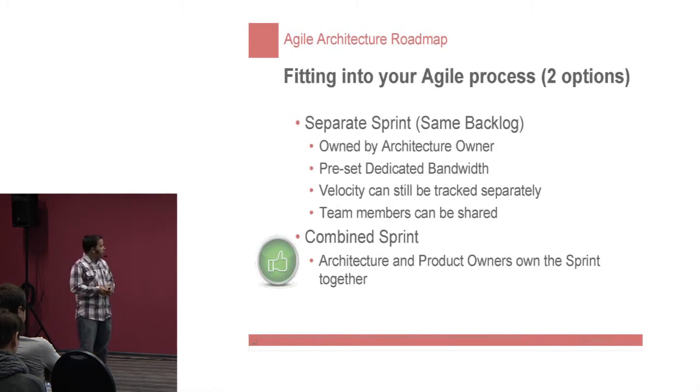So what we really went for was the combined sprint. Every team member is working in one and only one sprint, and they're doing stories from both roadmaps. That's what we like to do, and it's been very successful for us.